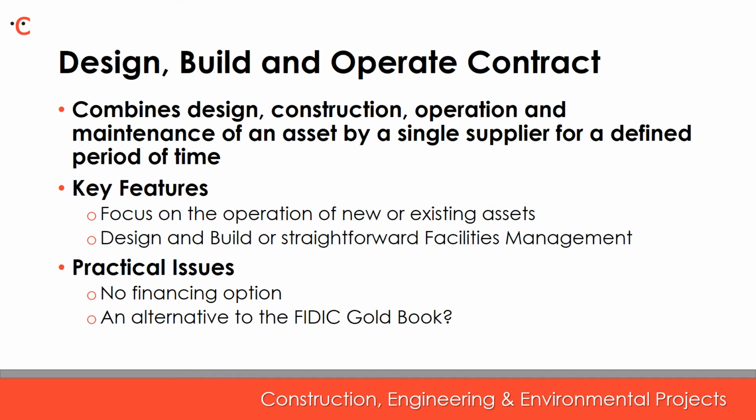Two practical issues that I've just highlighted on the slide I'd like to draw to your attention. The contract does not allow for or include any provisions for the contractor to fund the construction of the project, and question marks, I think, remain over whether in practice it will be a viable alternative to the more established FIDIC Gold Book form of contract, that is design, build, finance and operate, and only time will tell, but that certainly is the intention.